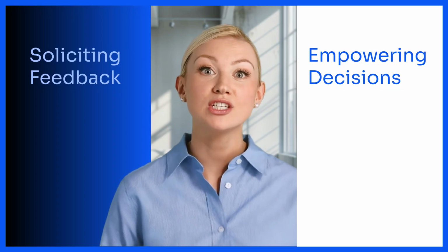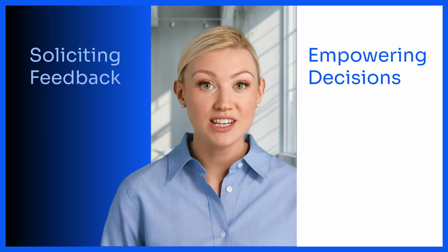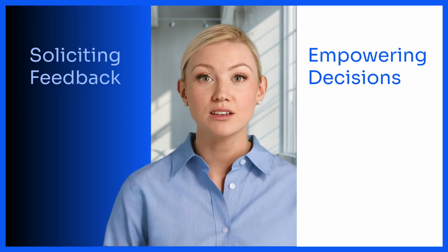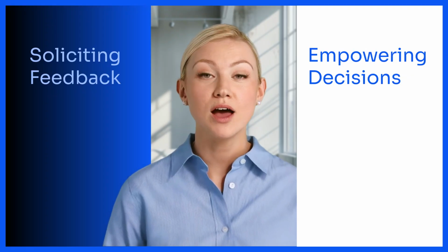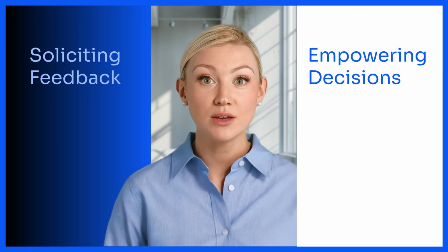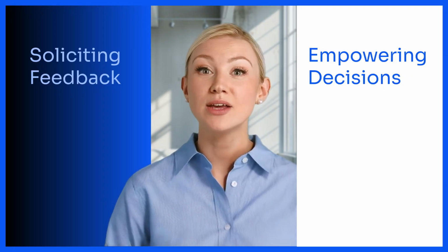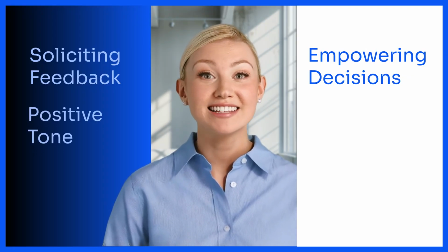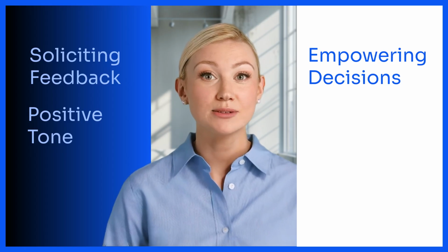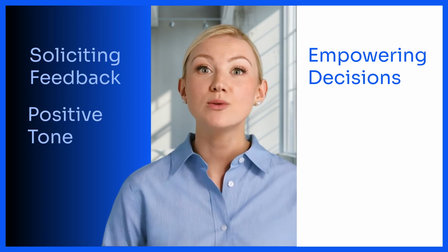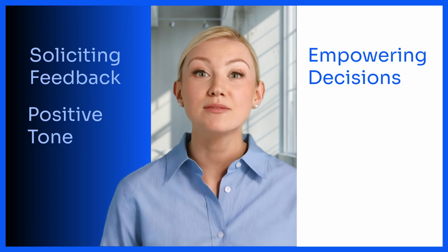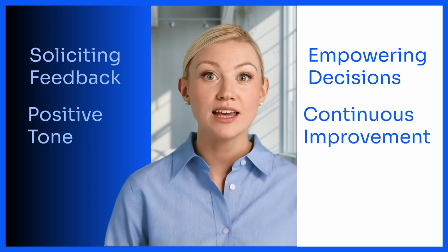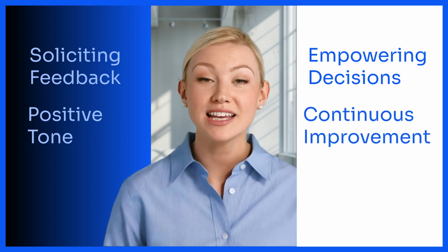After the follow-up session, hold a debrief with the entire project team, led by the project manager. This should be an open forum to discuss what could be done better, what was done well, and any best practices found along the way. Set a positive tone. Start by congratulating and recognizing the team and any individuals who went above and beyond. This will prevent the debrief from becoming a complaint session. Always reinforce your commitment to continuous process improvement and inform staff that a review will be scheduled.